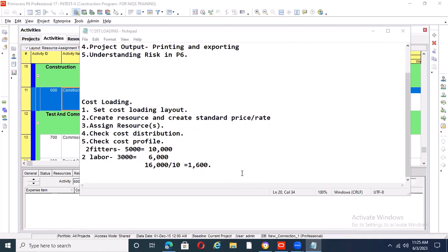On my schedule, I will not be recognizing a 50-meter length or 100-meter length, the ones that can be done in one day or even in one shift. So the activities that can be done, that is the detail you go to on your schedule. You don't have that luxury that you have on the BOQ, where you can sum up the activities and roll them up.